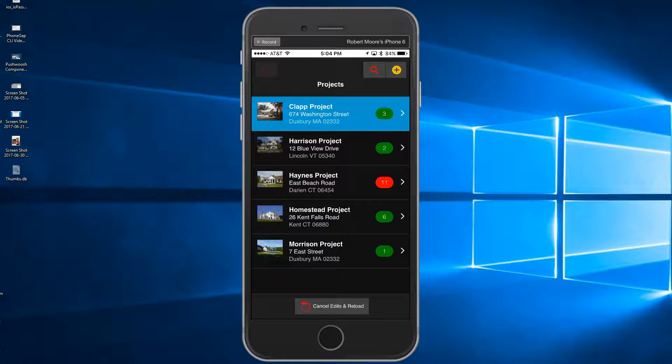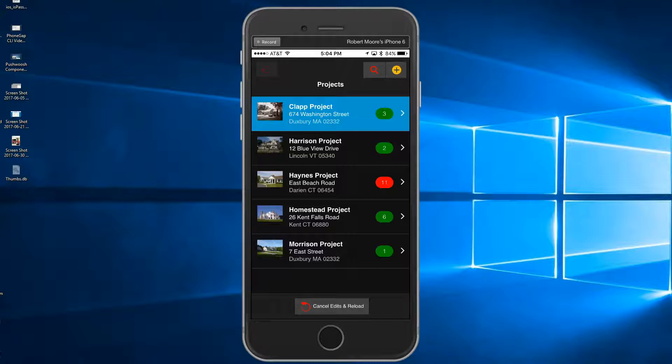All construction projects use punch lists to close out projects. A punch list is a list of items that need to be completed or resolved before the project can be considered complete and the final bill submitted for payment.